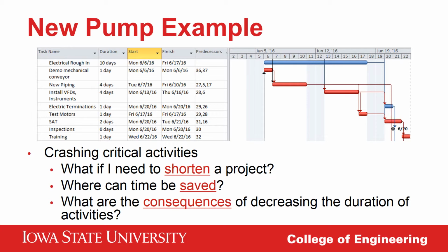The tank produces about 50,000 pounds of product per day, and the Gantt chart shows it out of service for a minimum of 10 days. So that's 500,000 pounds of missed production. In round numbers, the profit of this material is about 20 cents per pound, so $100,000 lost. Armed with this information, it's time for me to get to work.